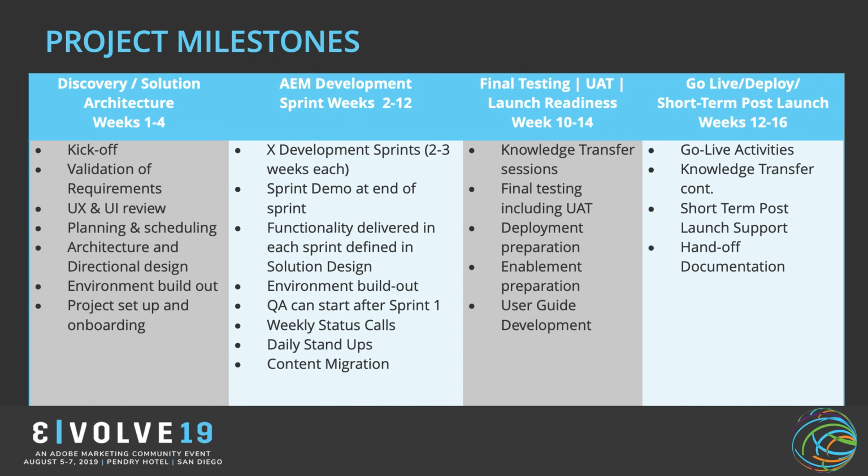Once you have that scope of work, you obviously need to start aligning what that means across that timeline. We have the hours, we have our budget, we know what resources we need. But what are we actually going to accomplish? Because the business at the end of the day wants to know how long it's going to take, what it's going to cost, and what we are going to do. So lining up those milestones, even down to what you think you're going to accomplish in each sprint, is key when we're talking about dependencies, because some of the work you're doing, you may need to do across multiple sprints. So you factor in enough time to accomplish that over multiple weeks.